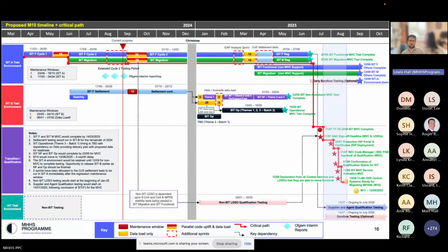I do appreciate it's an imperfect situation, but once you've got that plan, hopefully that allows you to reflect on some of the proposed dates in there. And provided the general feedback is that what we're proposing seems reasonable and sensible, and can be endorsed by all of yourselves as the new baseline, I think it's safe that you could work towards that as the interim position until Ofgem approve it. So, I'll stop now. Sorry, carry on. Makes sense.